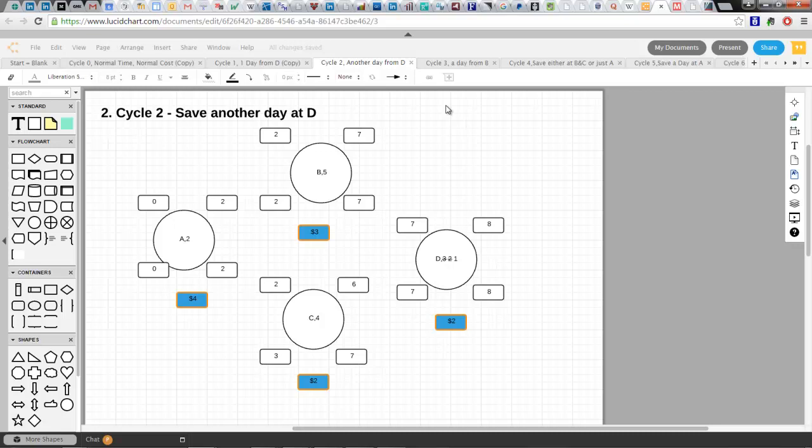Your bubble diagram starts getting a little more complicated, and that's why I removed the arrows. Just understand that the arrows are here. I took them off the diagram because it's starting to get a little bit complex. What happens is when you start reducing the duration of inner activities, when you save a day, it trickles through other activities, and all these numbers have to change. So that's where you'd want a software system to operate this, but I'm going to do it somewhat manually here.